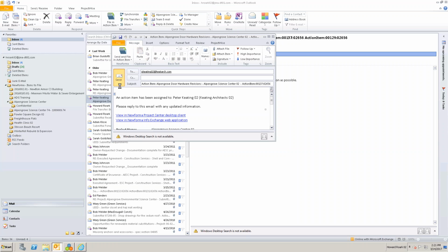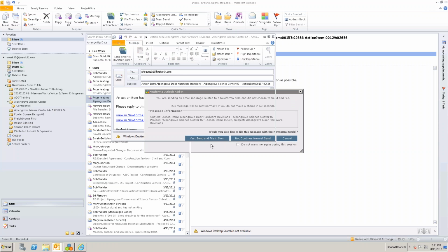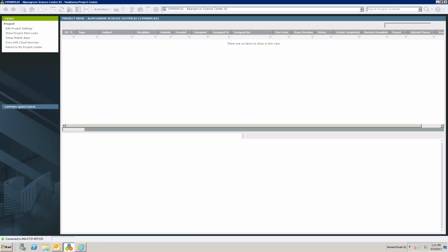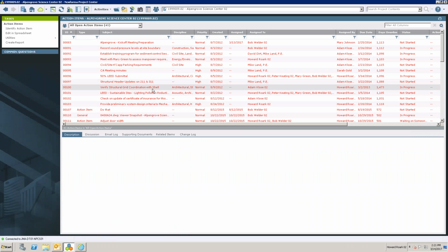Okay. And I take it this will create a dunning list? It'll create an action item list. So that's what this is working off of. Then will that email out a reminder to anybody? You can put a date in there to remind them that, hey, this is due? Yep, absolutely. So you can say remind them 2 days before it's due, and then afterwards it'll remind them daily. If it's an overdue item, you'll get a list of all of your overdue items saying, hey, you need to work on these. They're overdue now.